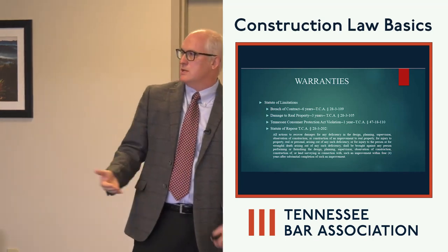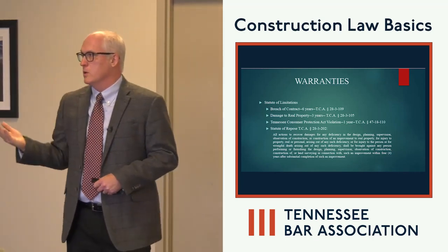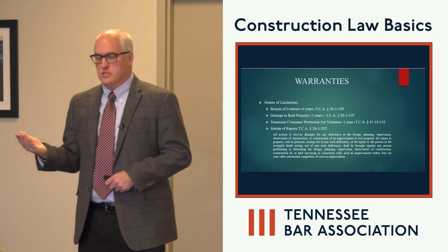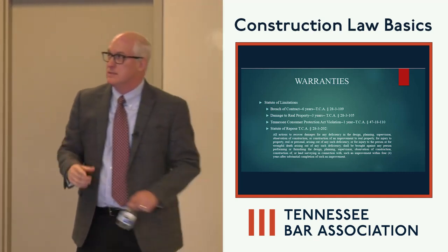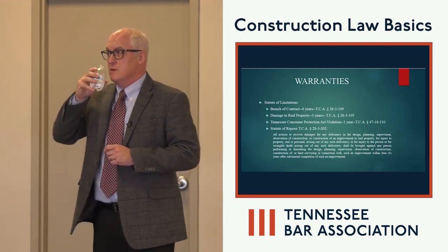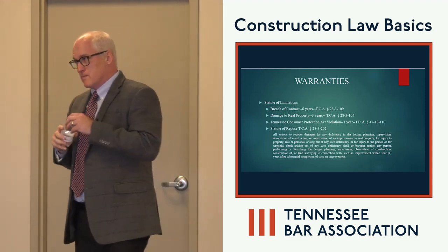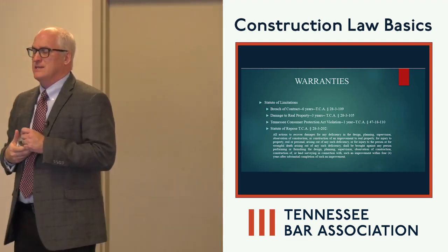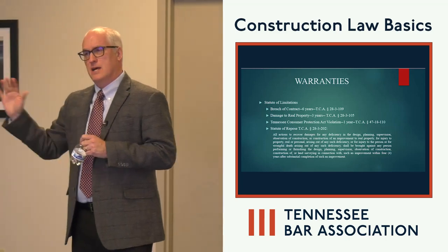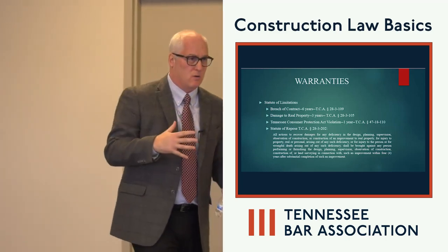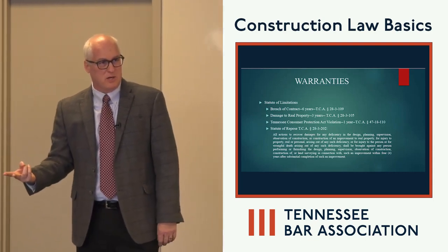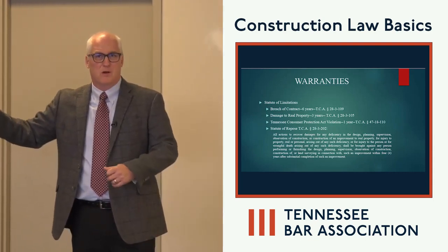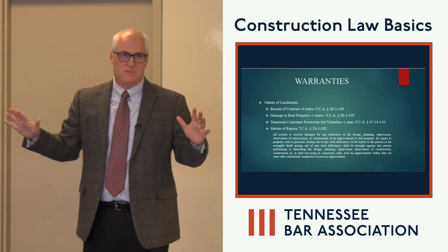Statute of repose, again, probably all in here are familiar with this. It's 4 years from the substantial date of completion. I actually tried a case on this about 7 years ago. I had a client that had a very nice house, built a detached 3-car garage, and I think he had 2 Porsches in that detached 3-car garage, a couple Harley Davidsons, so he had some nice vehicles.